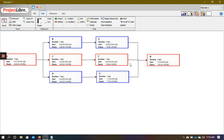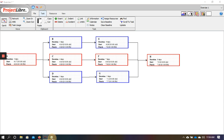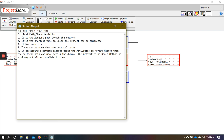Now that does not mean that activities B, E, or D, G are irrelevant or not important for the completion of the project. What that means is simply that the path in the middle is 24 days in length. Therefore, this project is going to take a minimum of 24 days to complete. So we take the longest path through the network, which in our case is the center segment at 24 days, and therefore we declare it to be the critical path.